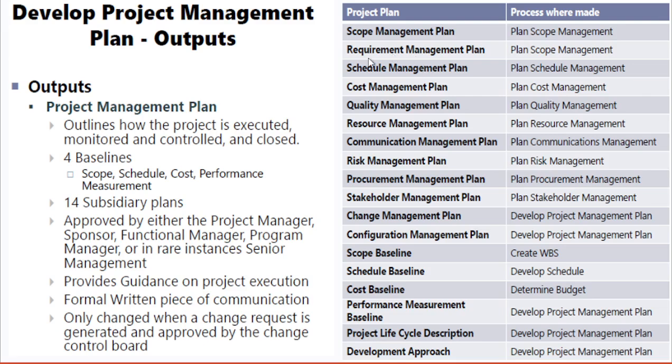execution. And you also have to consider having a formal or written acceptance by all of these management levels to ensure that all of these plans are well documented and approved before you proceed with the execution phase. And as we say, here is the change management plan, which you need to consider: only approved changes should be applied, so when you apply for a change request, it must be approved by, let's say, the change control board before applying any of these changes. Because any change in the change management plan can impact all of these plans at the same time, which you have to consider.